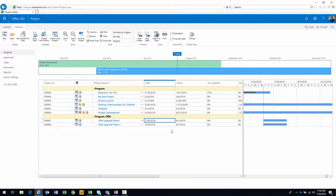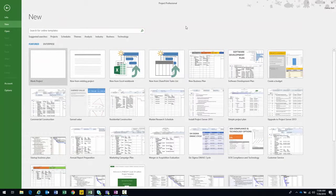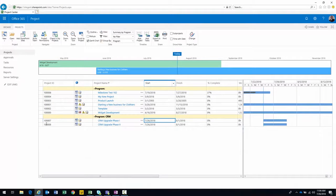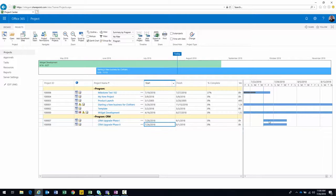To create that relationship, we use Microsoft Project Professional. Some people coming from a Project Pro environment are used to creating master projects, and you can do that in Project Online too. However, I don't typically do that because you already have the ability to view the two projects together within Project Online's Project Center using a common program field, which ties the two projects together in a single view.